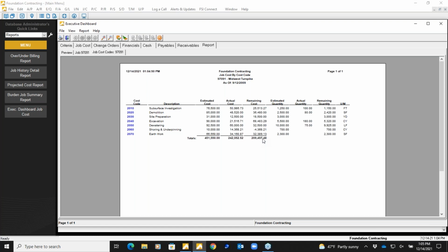So, you're able to see the cost codes that are on the specific job, and there's an estimated cost to them. That could be either entered in manually or imported from a third-party estimating software. So we're able to get that information in. And I always feel that it's very important that if we're going to look at the job as a whole, we want to make sure that we're not over cost or under cost, or where are we at with each line item on that job. So there would be an ability within the system to see estimate versus actual by cost code.